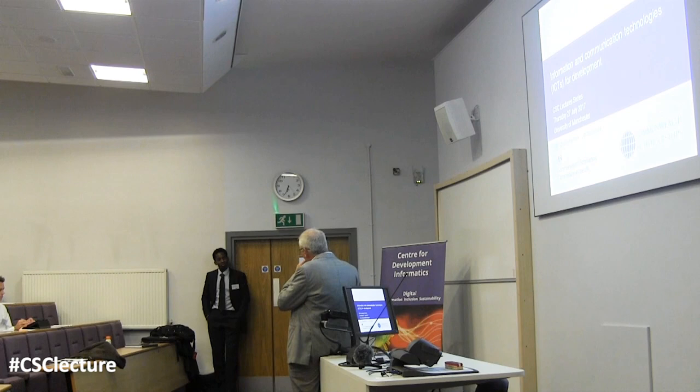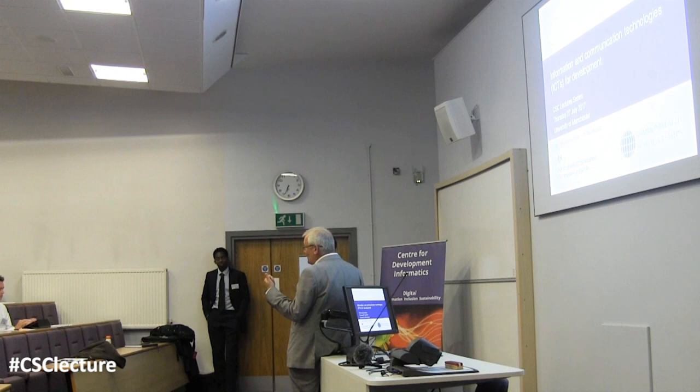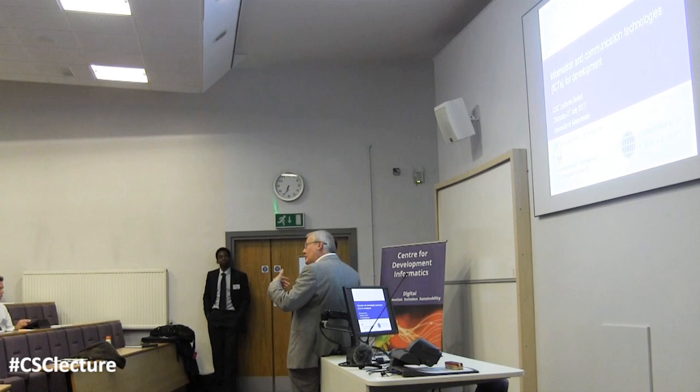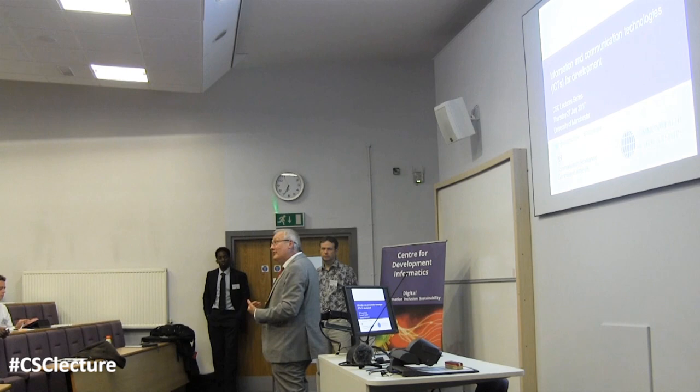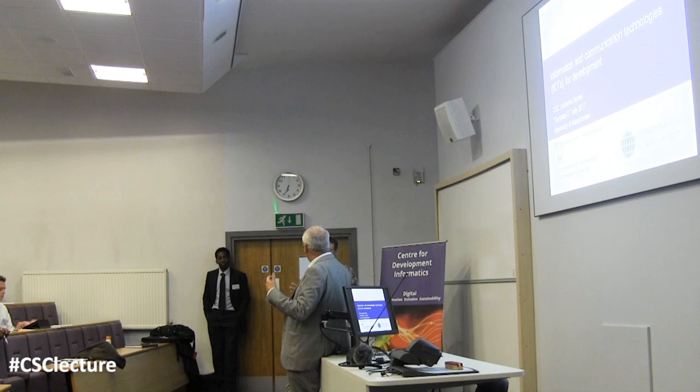Yeah. So the amount of data we have is still quite limited. But I think you've astutely picked on some good areas. One of the major problems with Agile is you want to get feedback as you go. So you're reliant on somebody to give you that feedback. And one of the problems is the people who are asking you to build the stuff really can't be bothered to keep sitting down with you and give you feedback from their point of view every 5 minutes. It's like, leave me alone, go build it, when you've done it, come back and tell me what you've got, you know? So there's a common problem, and this is well documented, that getting the customers to engage and give you that feedback is quite hard work.